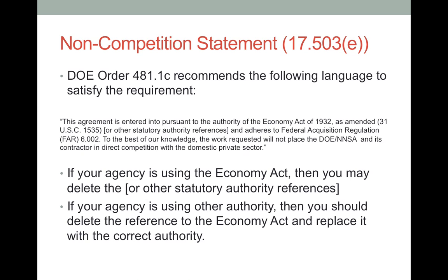While DOE will not ask for it, it is possible that a private entity will complain that the requesting agency is circumventing competition requirements by working directly with the laboratory instead of with their company. A minimum amount of documentation demonstrating that market research was done could make the response to that inquiry much easier for the requesting agency.